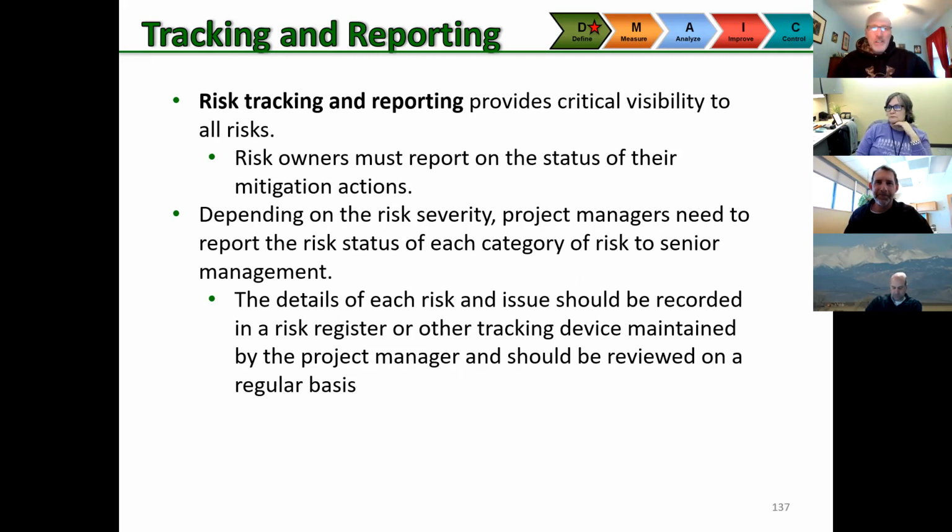The details of each risk and issue should be recorded in a risk register, and I'll show you what that looks like, or other tracking device. People in aerospace, for those of you that have been in aerospace, they all have a risk register, and you keep track of them over time and see which ones you've mitigated, see if we've improved the scores on them, that kind of thing.